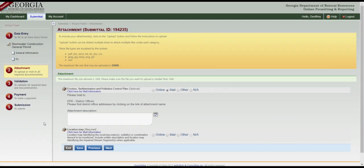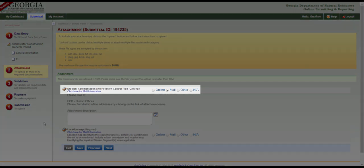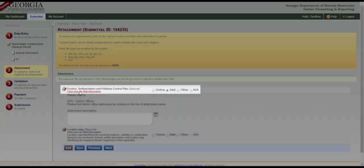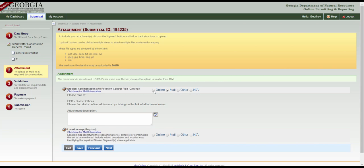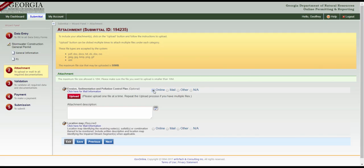To mail the ESPC plan, click here to get the mailing address to the appropriate EPD office. To submit a digital ESPC plan, select Online and then upload the file. To hand-deliver the ESPC plan, select Other.